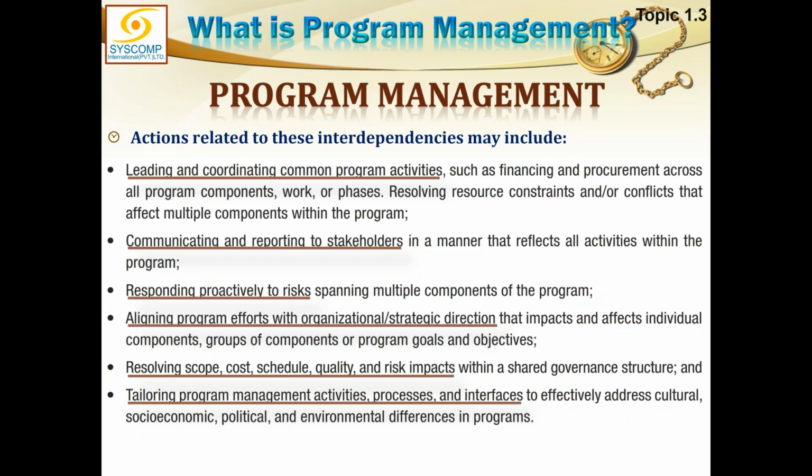And you understand that when there is a demand, supply will go short. So resolving resource constraints and conflicts that affect multiple components within the program. So I would say that the program will be responsible for prioritizing its components and allocating resources within the program.